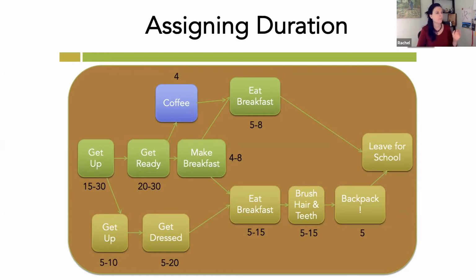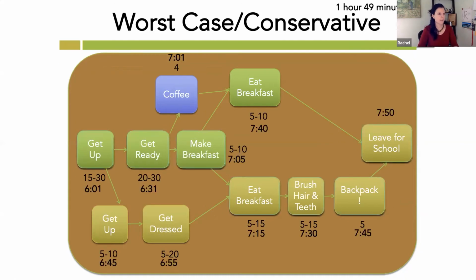So what I did in this case is we have to leave the house at 7:50 to get her to school on time. So what I did is I started at the end and I backed into it. So let me just show you that. So if we start here at 7:50, so this is our worst case scenario. This is like the thing that takes the longest, which is the end number, right? So here's 7:50, we got to walk out the door.